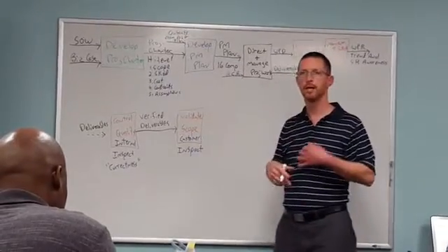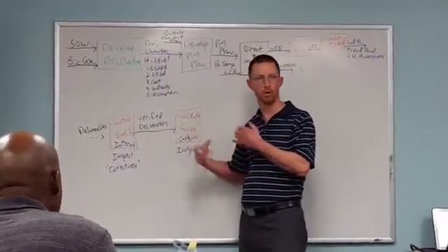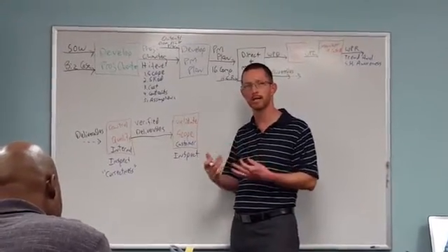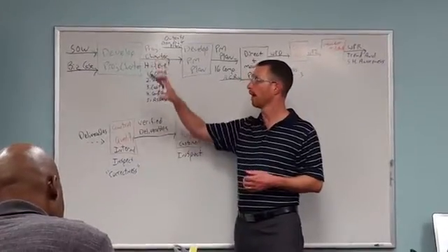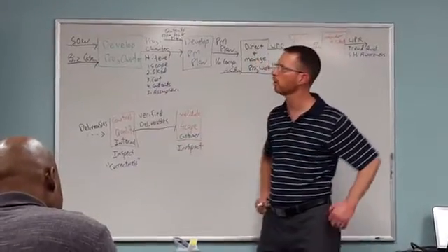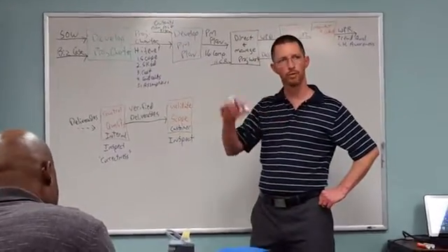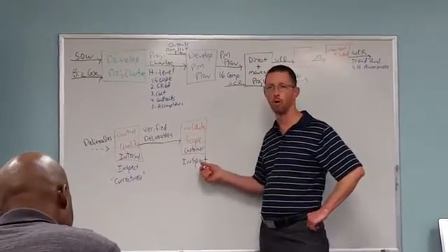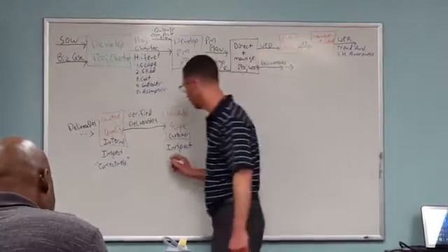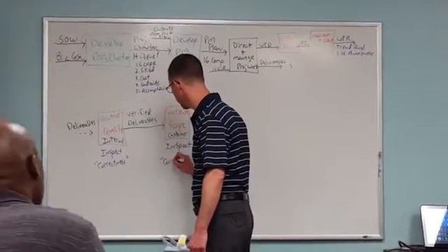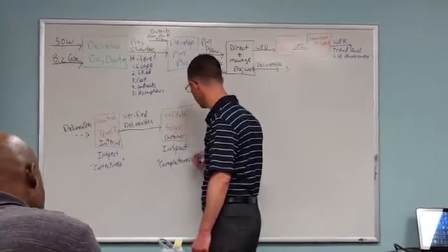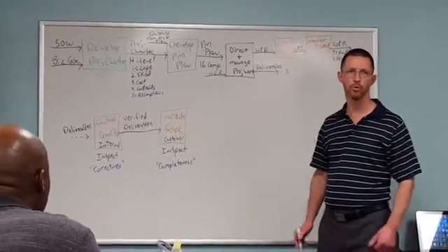So you can kind of understand that, hey, at this point, our customer is going to inspect the deliverable. And what they're inspecting it for, they're not a technical expert. They don't know what the electrical wiring code in the wall is, right? If I'm building a building. They can't come in and say, okay, the electrical wiring is in fact up to code, for all the various parts of the project. But what they can do is they can walk through the building and say, hey, this looks great, man. We're ready to move in here. So what are they inspecting for? They're inspecting for completeness. Does the deliverable item completely satisfy my need? So that's what we're doing during validate scope.